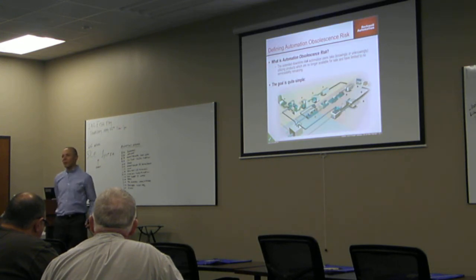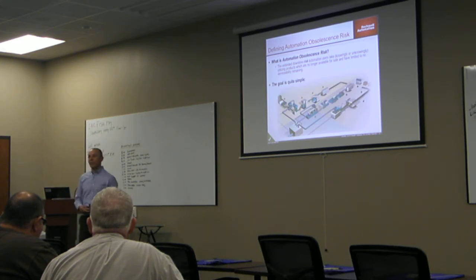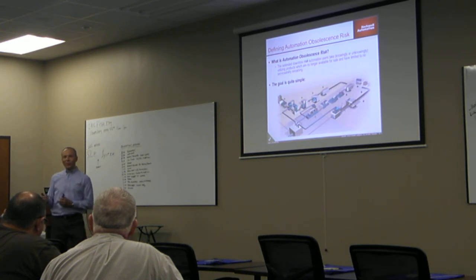I've been in the same situation when I was trying to get the finance project. It's no big project, right? But there were obsolete, mechanical error parts. So it will cost us because we cannot find them. There is nothing that fits that measurement. If we were going to do it in a downtime and spend this $80,000, we'd be in trouble. Didn't get the money for it. But when they pumped them down and didn't have the parts, it cost $150,000 to really scramble and do the project on the run. And that was not counting downtime. So like you said, that approach is there, but it's hard to change it.